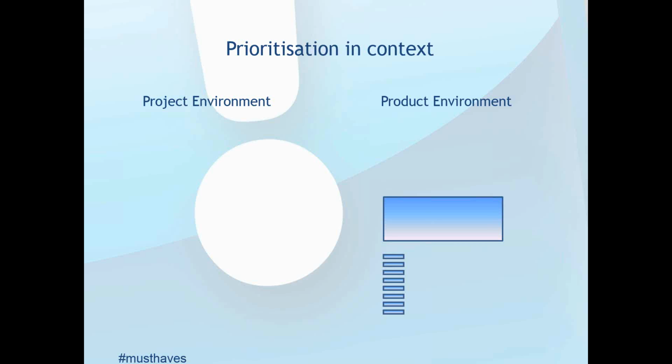And the point of this level of prioritization is that really MoSCoW isn't brilliant in this sort of area, to be honest. If you've got a series of enhancements and they're 2 or 3 day pieces of work, it's very much regular fries. You don't need to do anything too dramatic. You would then batch these up into 2 or 4 week sprints or time boxes, and this is very much what I call BAU, business as usual. It's routine work, they're enhancements, it's pretty simple.